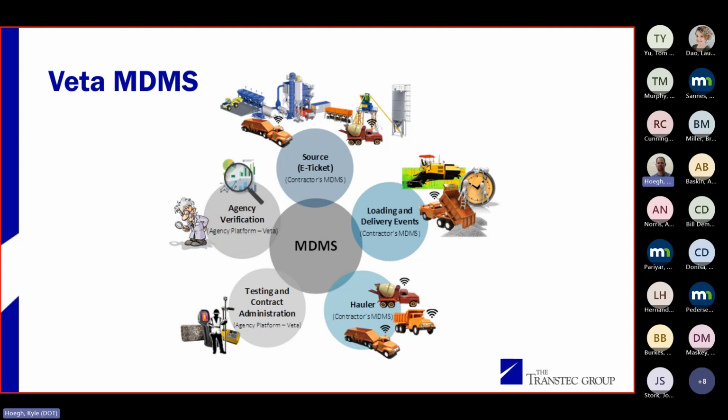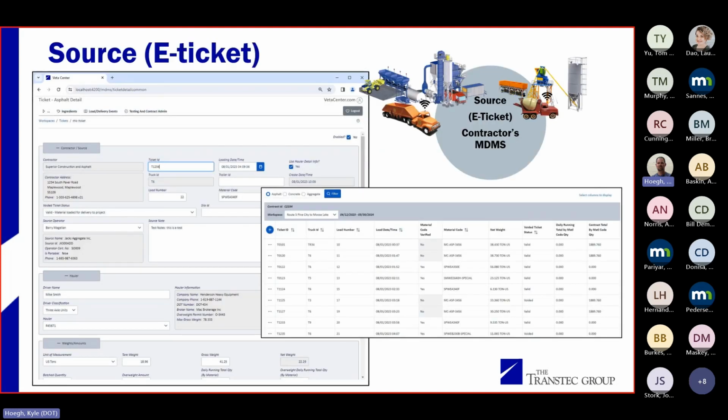So what is a ticket? How much goes into a ticket? MDMS was developed as a guide to the things that could be in a ticket that we might want in a ticket. And it has all these different categories. Of course you have the ticket, and then you also have the loading and delivery events, hauler information, testing, contract administration, and agency verification. So I'm going to go over each of these little bubbles. The first one's your